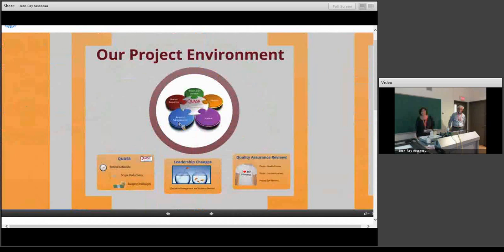All right, so I'm just going to speak a bit about our project environment specifically. For those of you that weren't in the prior session that also touched on QUASR, I'll just briefly highlight the fact that QUASR stands for Queen's University Administrative Systems Replacement. So it was a significant initiative. We implemented 26 PeopleSoft modules. We decommissioned 23 legacy applications. It represented over 300,000 hours of effort. And it was a budget of $35 million. It was really a complete change in our technology for admin systems. It covered finance, student, and then HR and payroll. So this example, again, is specifically related to the HR and payroll implementation that went last.